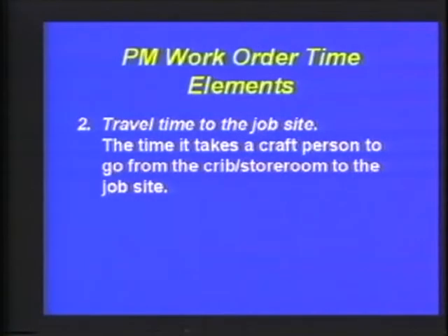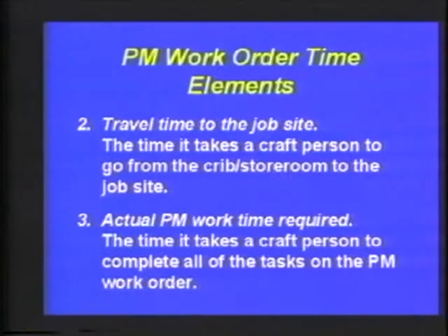Now, the travel time to the job site can be estimated. In many cases, the planner scheduler will actually walk the mile, if you will, to the job site and determine approximately what the estimated time is. Again, this is not an engineered time standard approach. It's an estimated approach.